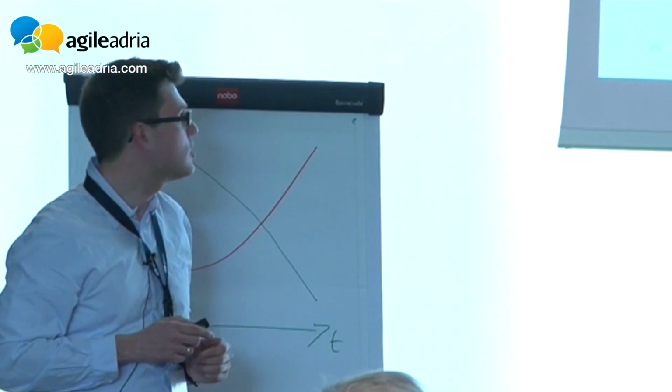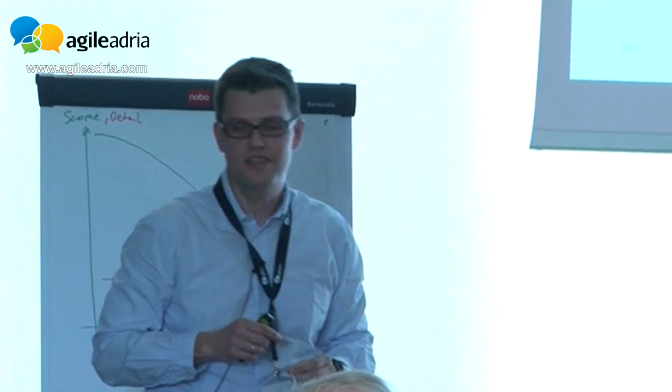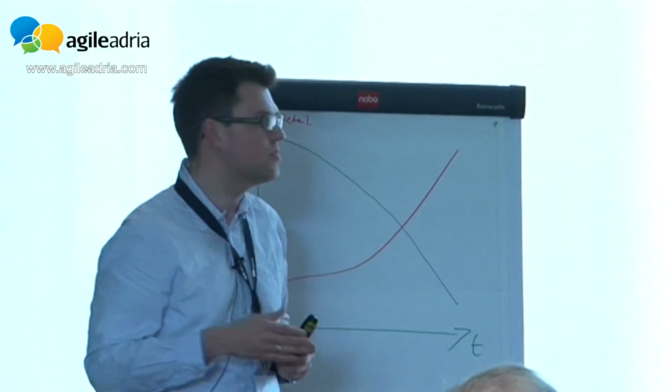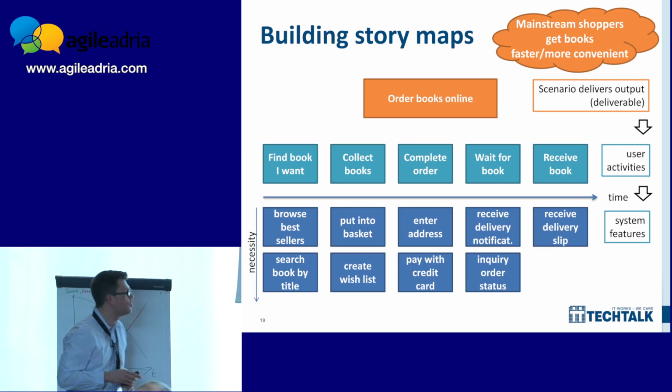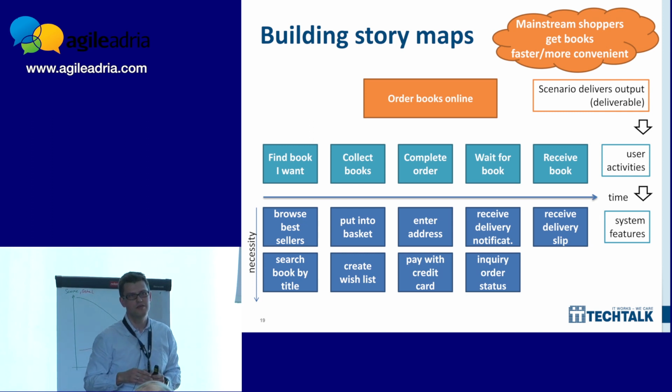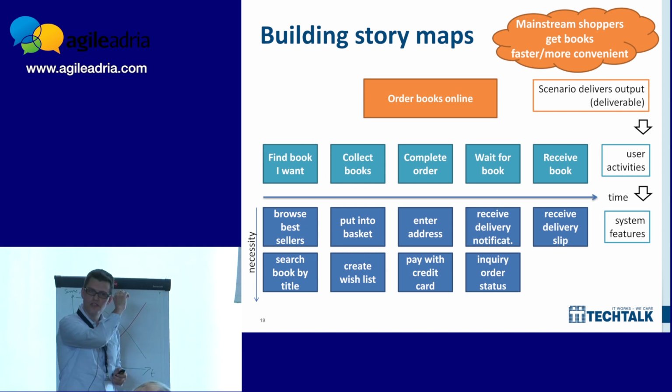And for this minimum walking skeleton, it's perfectly okay. This doesn't mean yet that you can ship it, but it's perfectly okay that you probably have some manual workaround somewhere, or you even omit steps in the beginning. And of course, you can use the same kind of slicing then. What's the minimum you can ship that people are actually using?